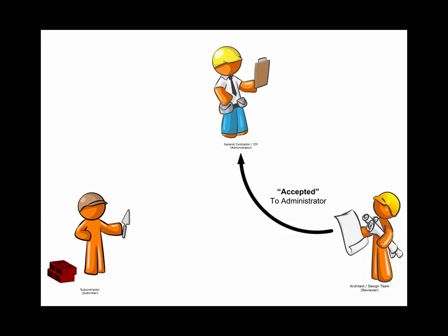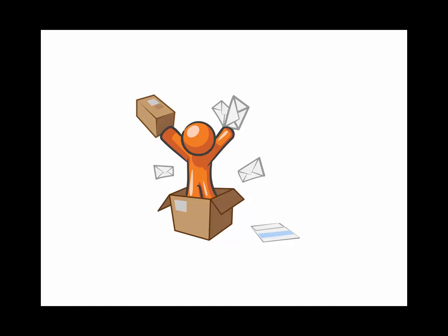Once the submittal review is completed, the subcontractor will be notified and can order the products and materials needed to begin construction. It is unusual for a contractor to begin ordering or construction without the accepted submittal because they would not be paid if the submittal is rejected.